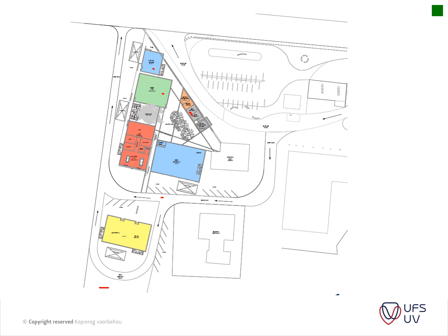If you think about a guardhouse, the rate per square meter is quite high, although there's not that much detail that goes into it, but it still needs a strip footing, it still needs earth filling, it still needs a wall, roof, some electrical installation. So that is the type of considerations when you do your per square meter rate build up. Okay, and then obviously applying that.